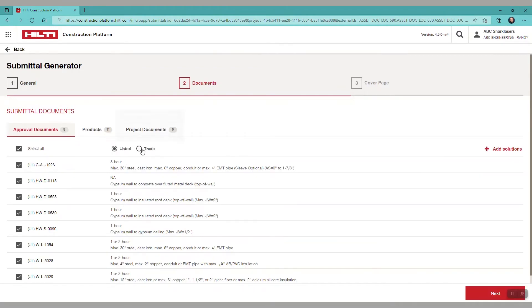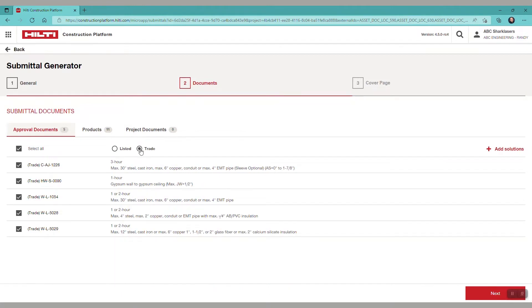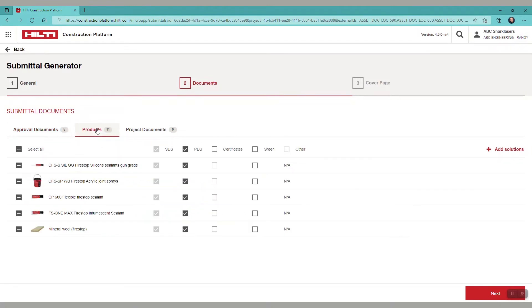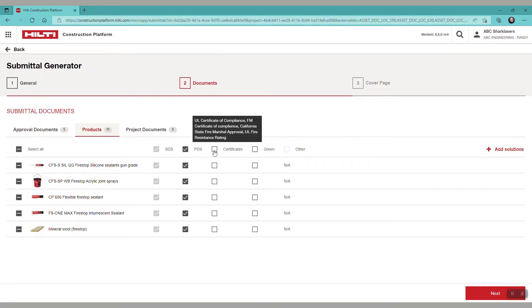We have options to select a listed view or a trade view. For the demo, let's select trade. We can then select the specific documents we'd like to appear in the submittal package. The SDS is required on every submittal. The PDS is pre-selected.